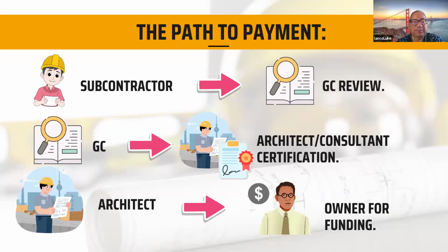So I'll give you an example. There was a situation where the contractor billed for elevator at 60% complete. But when I went to the job site, the elevator wasn't even 30% complete. And I questioned that, and the response was, oh, well, we're billing for materials that were ordered, but we didn't get it yet. So I said, well, where's the materials? And they said, well, it's ordered, but we didn't receive it yet.